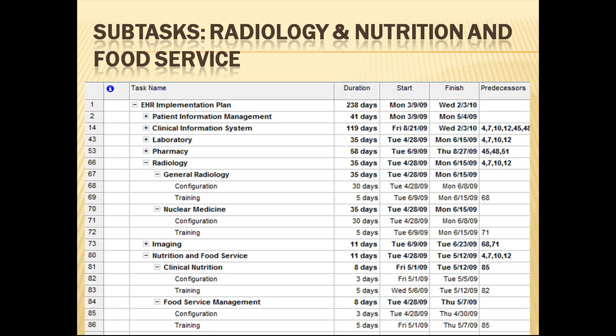Here we can see the radiology subtasks, which are general radiology and nuclear medicine. We can also see the nutrition and food services subtasks, which are clinical nutrition and food service management. The number of days for configuration and training are inputted into the duration column, and the total days are then automatically computed by the software for each of the tasks and then for the entire project as a whole.